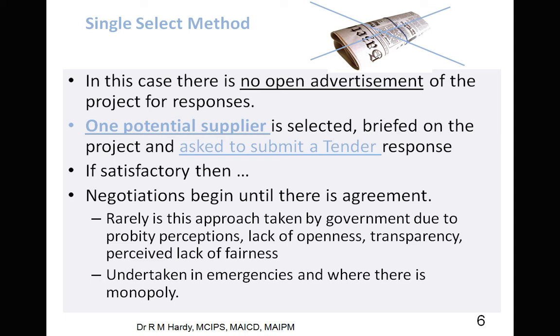Okay, when you have a formal tender, at the end of the tender period, you either have to appoint somebody or abandon the process and do it all over again. So that's the other thing about tenders, is that there's only 2 outcomes from the tender, one of which being don't appoint anybody and don't negotiate with anybody, or to re-tender it. Okay, and once you have abandoned the process, then you can start again, and that may be whatever process you choose, but there needs to be a bit of time that goes between the end of the formal tender and the negotiation with the preferred builder.